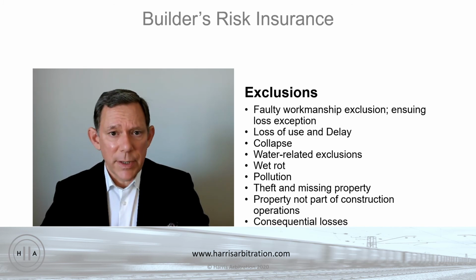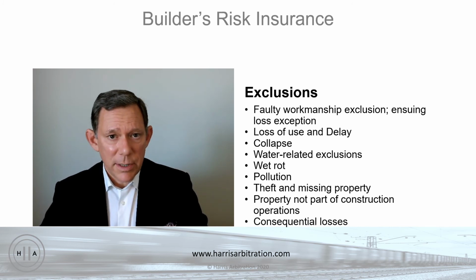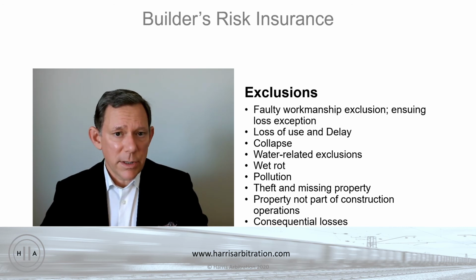contractor's using some solvent to perform some task, like putting down or cleaning up some sort of adhesive. Well, that stuff gets out, it damages other property or hurts other people on the job and whatnot. The pollution-related risks are essentially so great that the insurance company has made a calculated decision: okay, we're going to exclude from the garden variety CGL policies or builder's risk policies risks associated with pollution-related events.